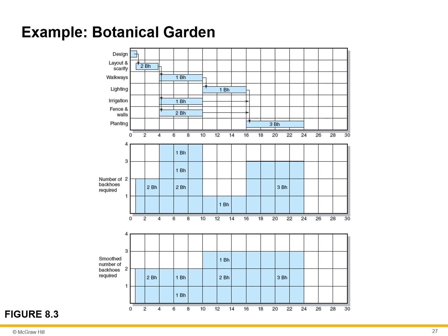Backhoes are not easily moved from location to location. There are costs associated with changing the level of resources needed. The same analogy applies to the movement of people back and forth among projects, like I mentioned in the theme park situation. It is well known that people are more efficient if they can focus their effort on one project rather than multitasking their time among, say, many projects.